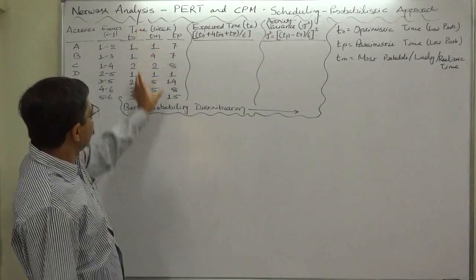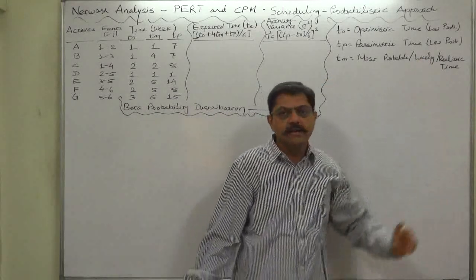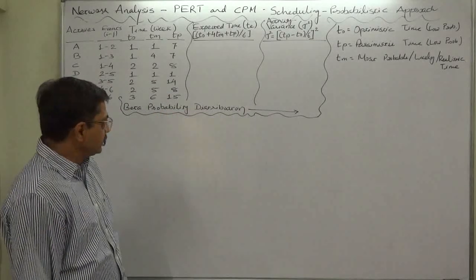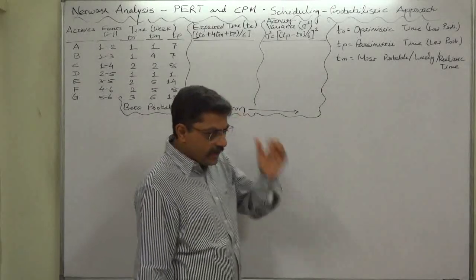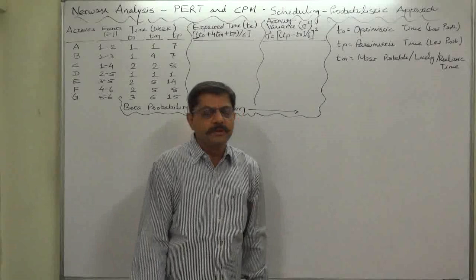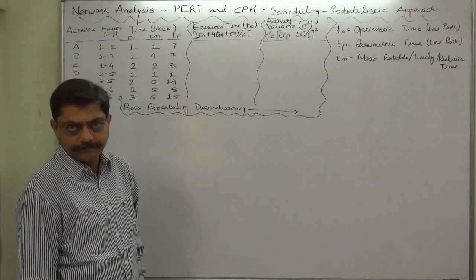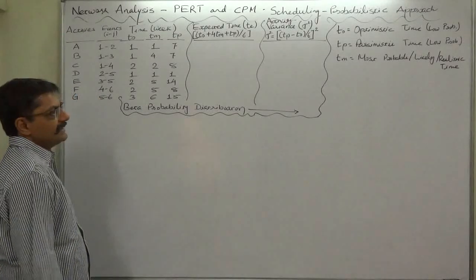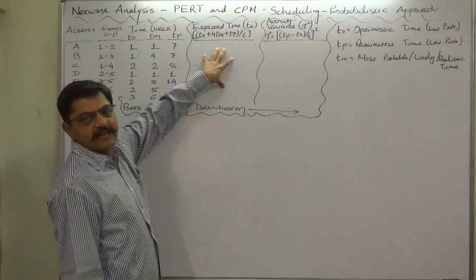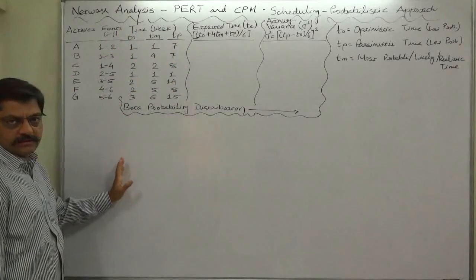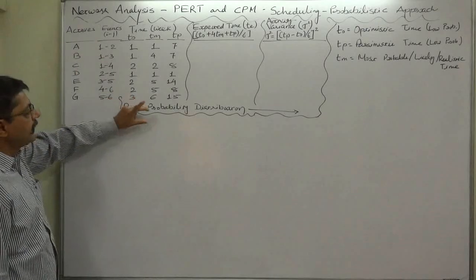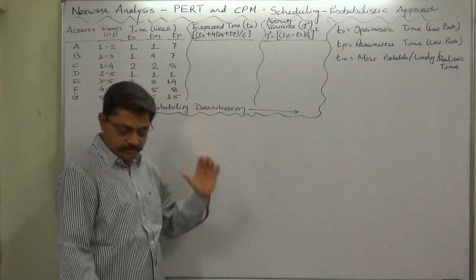The third and middle estimate is TM, the most probable, most likely, or most realistic time, which has the highest probability of occurrence according to the beta probability distribution. On average, the probability of TM is 4 times the probability of optimistic time and pessimistic time. On the basis of these conclusions of beta probability distribution, we can arrive at an expected time for each activity — what time duration can we expect to complete a particular activity if we believe the time follows the beta probability distribution.